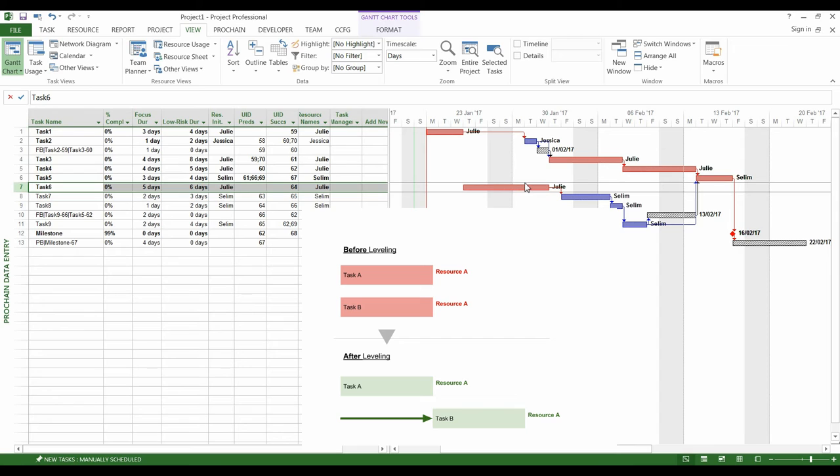Doing so, we do not plan multitasking. Finally, it is important to emphasize that the delivery date of the project is the end date of the project buffer, here, the 22nd of February.